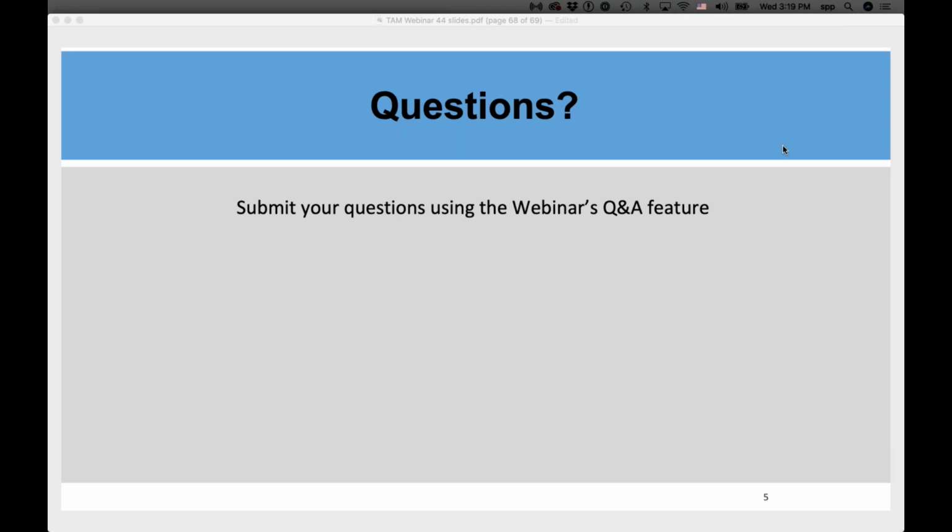That's a great question, and that's something all states struggle with, what I'd call scope creep. One is first you go to the intent of the project. What is the intent of the work? If it's a management type project to address pavement performance or bridge, we've got to take a look at the budget, what's allowed, and then work it from there. Sometimes we do have to add work to it. But in the STIP itself, in the database, we are recording the category, the project limits, i.e. termini, and then following through from there.